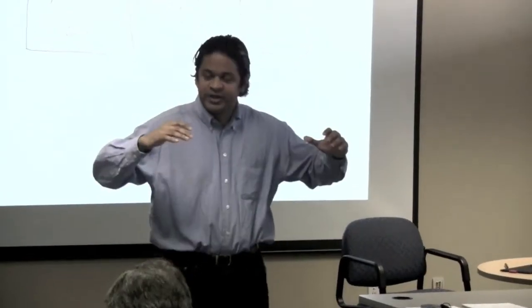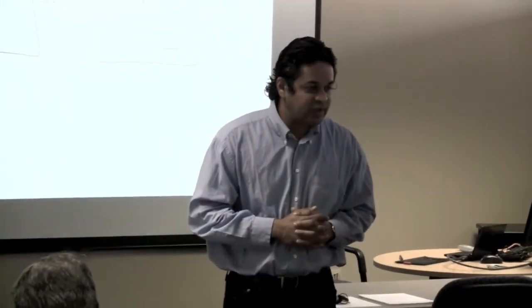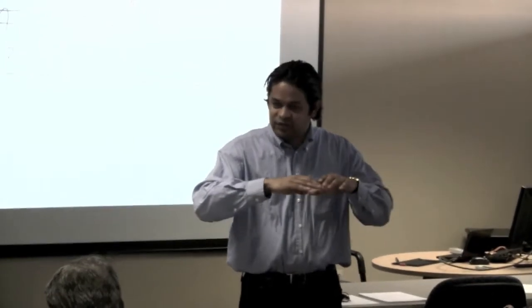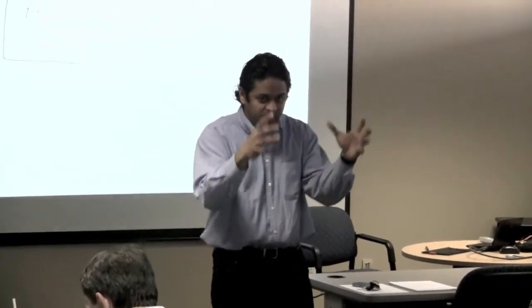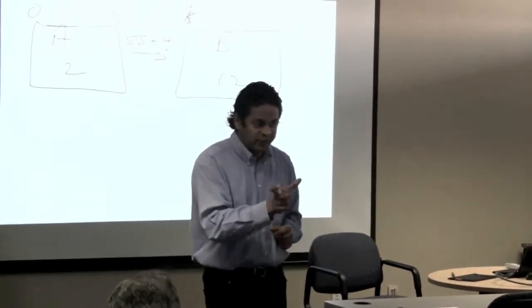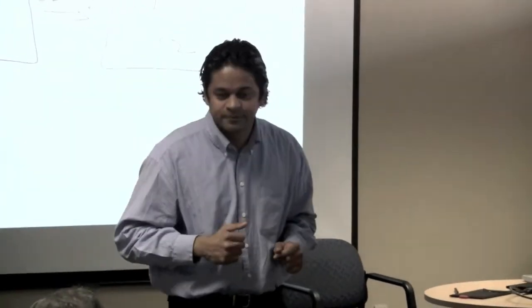You've got to be able to consolidate all your projects under one umbrella. In the 21st century, management effort is very, very expensive. As such, you've got to be able to benefit from economies of scale, and you do that by consolidating all your projects under one umbrella, and that's called the PMO. The Project Management Office is where you centrally coordinate your projects, and you also ensure conformance to guidelines and policies.